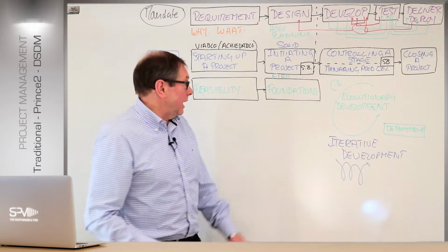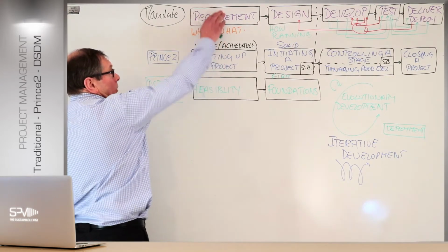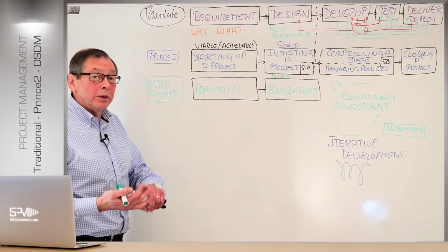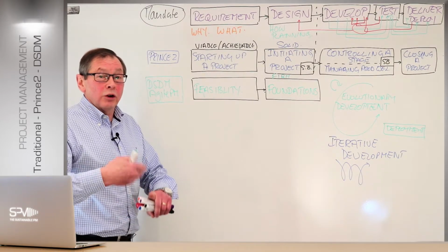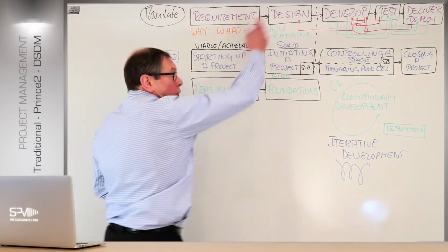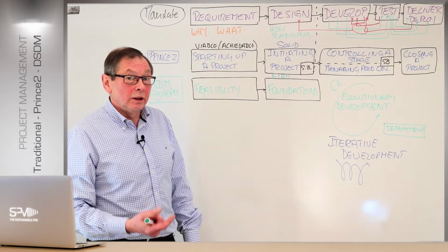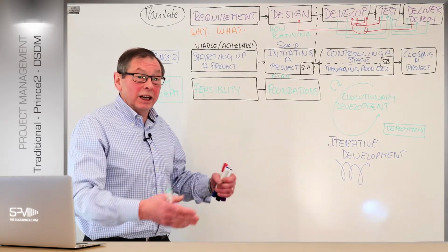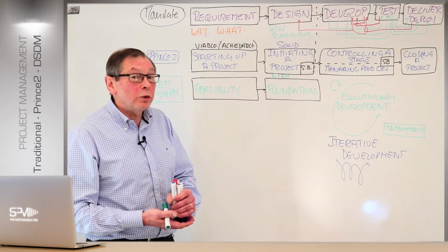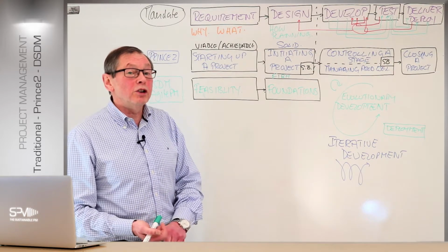So understand that, DSDM Agile runs feasibility like starting up, like requirements. It's understanding the high-level view of the project from a quality, a build, and a business perspective, and agreeing the information formally. Once we've got that understanding, now it's worthwhile going and spending a lot more time and building the project here in more detail. This is really great, because now we get a better understanding about estimations on time and costs, what the solution, i.e. the scope, is going to look like, and how we're going to build it from a development point of view and run it from a project perspective.